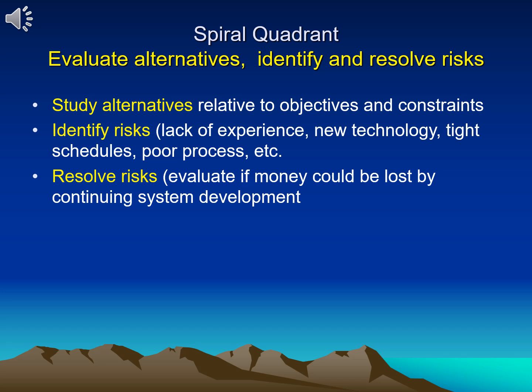For example, if a company wants to develop a mobile payment app, they must decide between building a custom app from scratch, which offers full control but requires more time and money; using an existing platform, e.g., integrating with PayPal APIs, which is faster but may limit customization; or outsourcing development to a third party, which reduces workload but may introduce security risks. Each alternative must be evaluated based on feasibility, efficiency, and risk factors before choosing the best one.